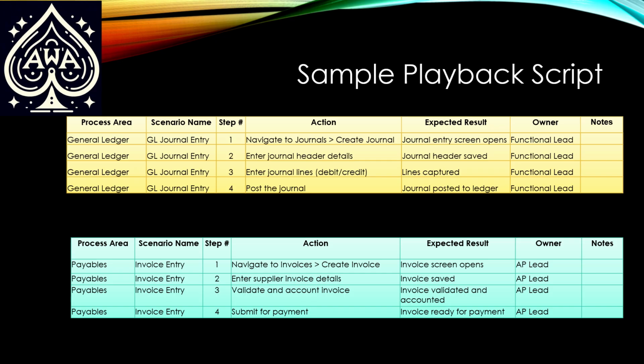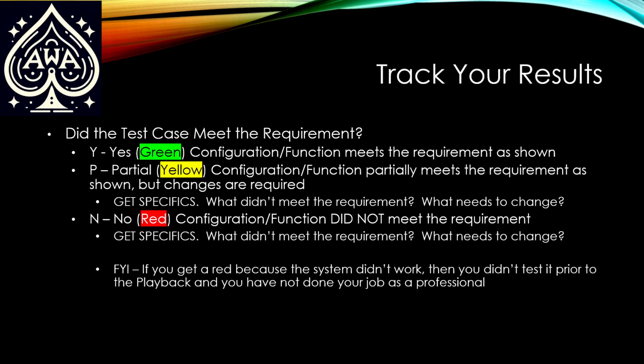But each of these steps is giving you test scenarios, test cases, which goes back to your use cases, which go back to your requirements, all the way through there. It's tying back to those to show that, yes, we've seen everything. Yes, it passed. It didn't pass. It was successful. Yeah, it kind of needs some tweaking or flat out didn't work. Here's what we came back to, tracking those results. So did it meet the requirement? Not did it work, did it meet the requirement?